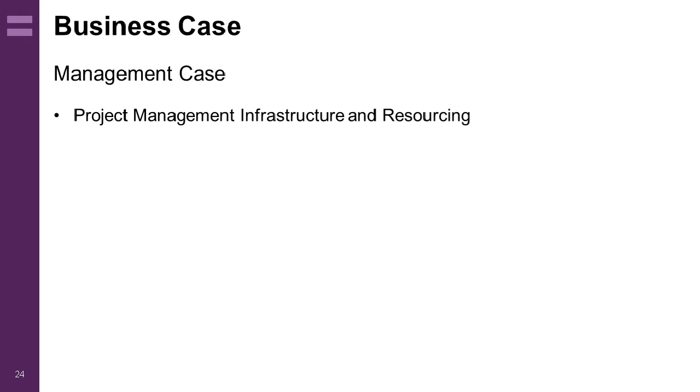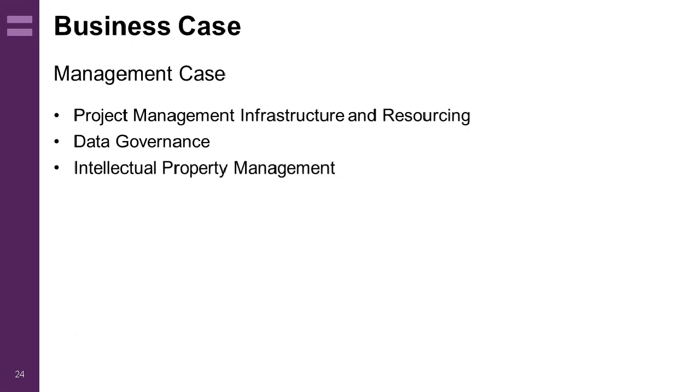This section also deals with data governance and will set out in overarching terms what the IG strategy will be. For example, will a data protection impact assessment be required? Will data sharing agreements or data processing agreements be required? If intellectual property rights are generated by the project, then how this will be handled is also set out here, including how ownership will be determined. This can then be used to inform contracts when they're written, particularly important if you're using subcontractors.